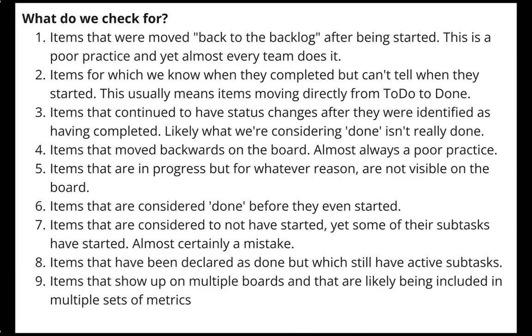So we have one column on the board that is done, where we stop the clock, and yet there's still status transitions that happen after that. So for example, a team might say, we're done when we have done our part, but it hasn't been deployed to production yet. That's a separate status change. So this report is calling that out and saying, well, you kept working on it after you said it was done. So does that actually make our cycle times invalid? It probably should. So this is feedback to us.